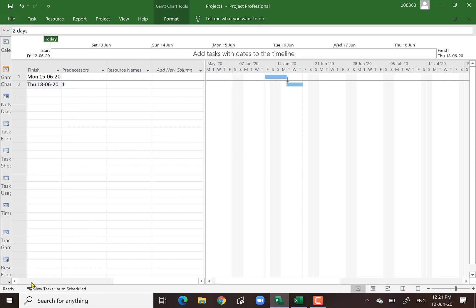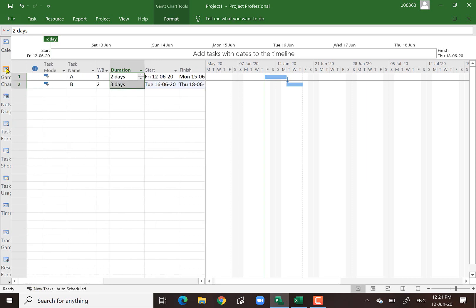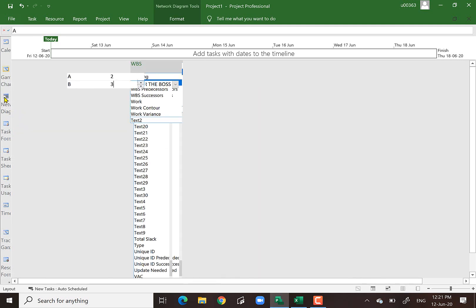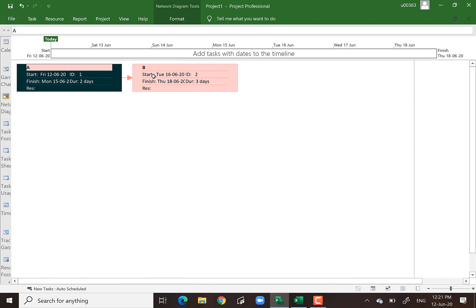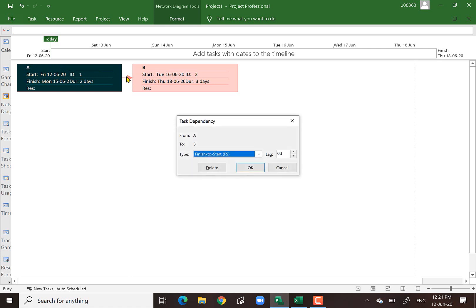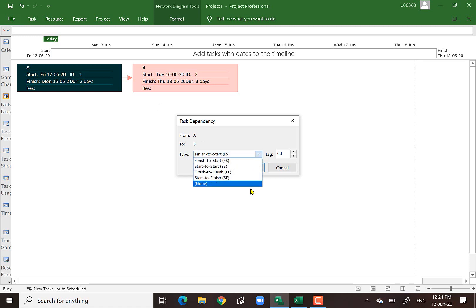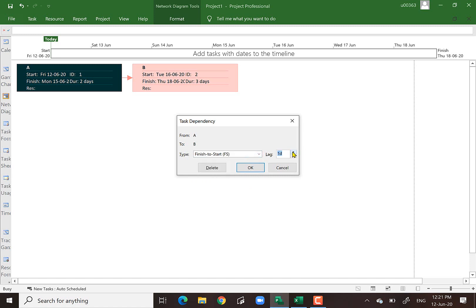Let's go to the Network Diagram view. You can see A and B here in the diagram. Double-click on the link and you see the relationship is finish-to-start. You can change the type of relationship, and even add positive or negative lag accordingly.